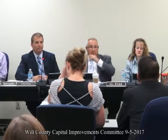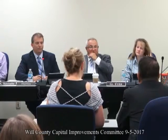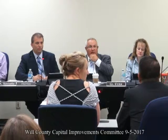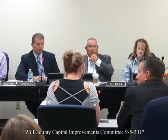All right, so I have several questions. One, why was there no estimate for signage? Didn't we have an idea what it was going to cost us? We did carry an estimate, and I think it was over $200,000 in the initial budget. However, we didn't include it in bid package number 4 because we weren't there yet. So you weren't going to bid it, that's why. Right. But there still should have been a construction estimate for signage. It looks like you guys didn't do something.